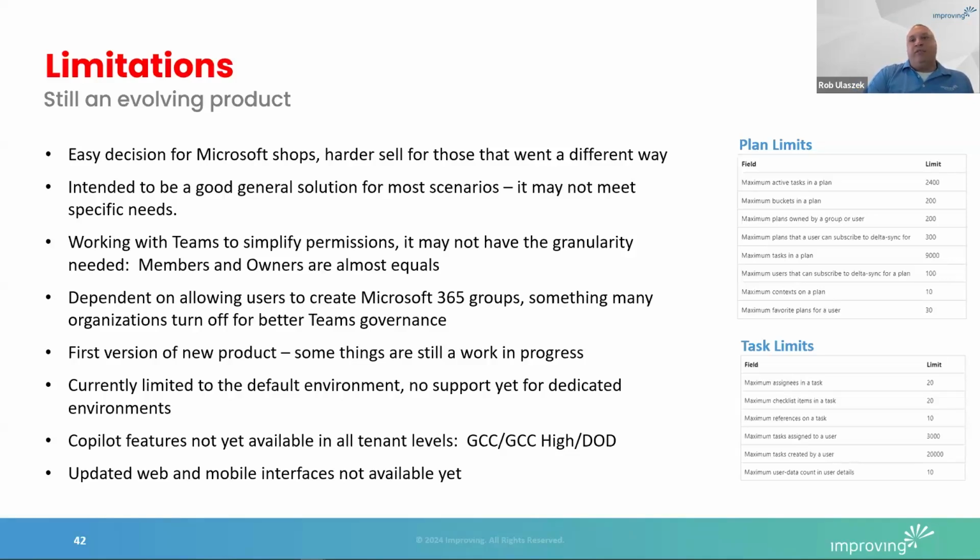Next thing is working with Teams. This is fantastic. We work within Teams, we put everything wherever it needs to be. The problem is Teams is very egalitarian. Owners and members do not have that much of a difference between what they can do in a team. And as it works right now with Planner, owners can create teams and delete them. Members can modify. And that same client had an issue where they did not want members of a team modifying a plan. So that's something to keep in mind.